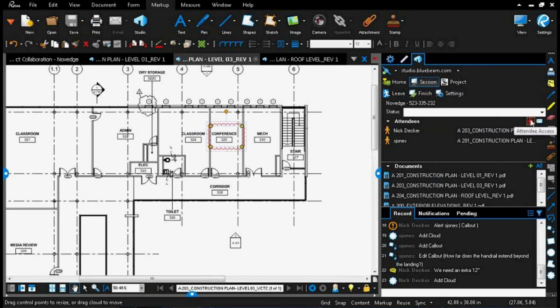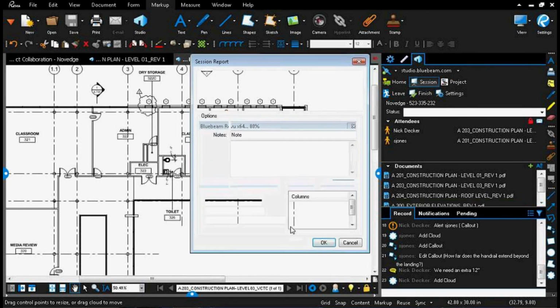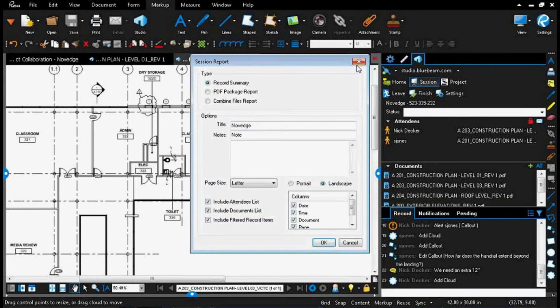So at the end of the day, I want to run a report. And so you can do these reports from down here in this little tab, in this little thing called the 5 documents. And for example, if you want to run a report on these sessions once a week and you have it open for 2 months, you can have basically a time-stamped report of exactly how the project looked at a particular time period as you progress along, as you're 25, 50, 75% along.